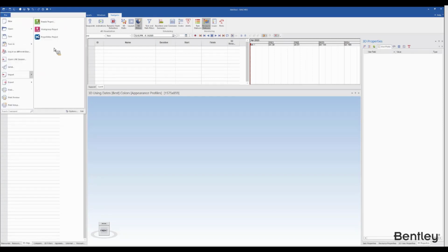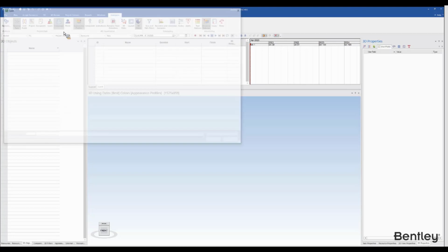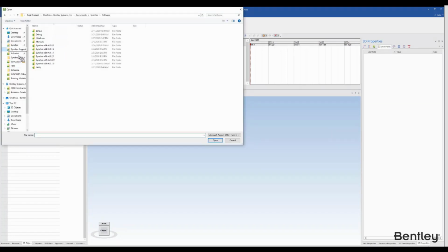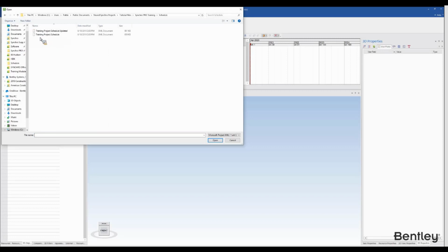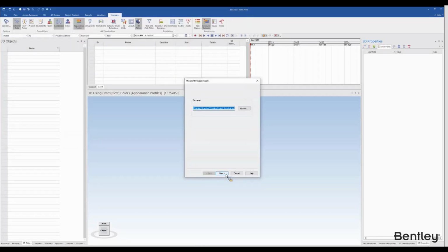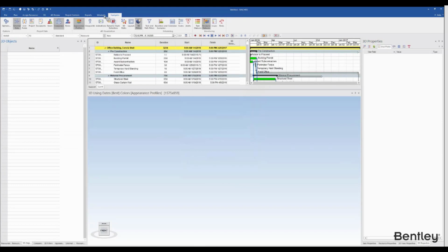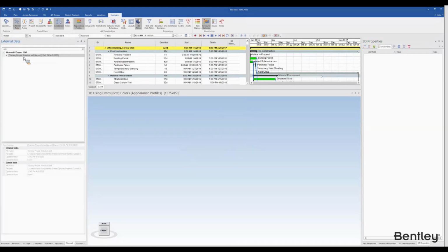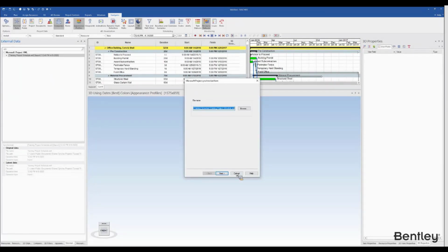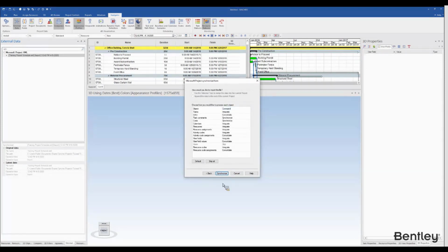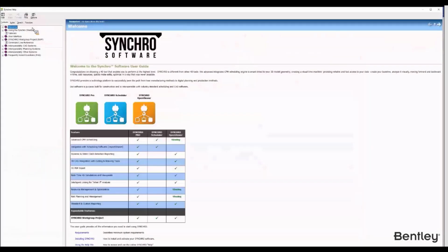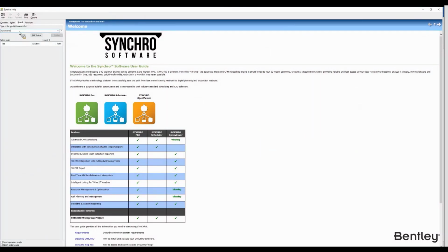And then again, every update you do in the XML. So for example, I'll just import this one. I don't have a P6 XML right now, but it's the same process. But let's see, if I import the schedule just using default settings, any updates you make, you go to the External Data tab, right click on that and Synchronize From. It gives you a bunch of options over here for integrate, consolidate, synchronize, and I won't be talking about this here, but a good resource to check what those things do is using our Synchro help. So you can just write synchronize option here.